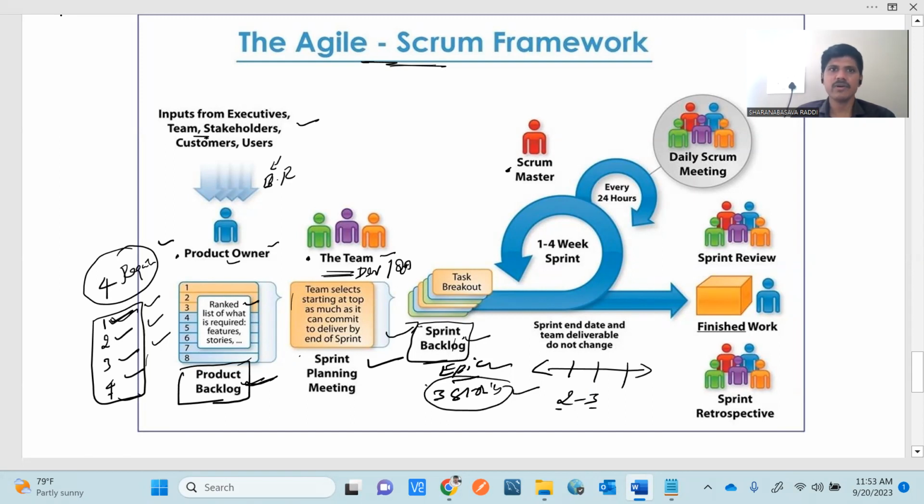That is the standard for the Agile Scrum framework. So in this sprint, for example sprint 1, there are 3 weeks. For these 3 weeks, they are going to implement these 3 stories, test these 3 stories, and deliver these 3 stories or 3 features to the client.